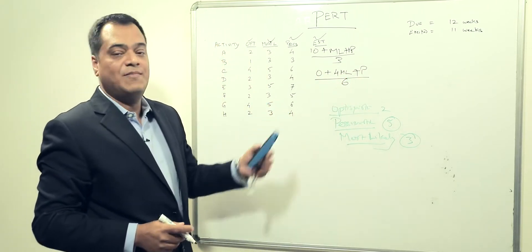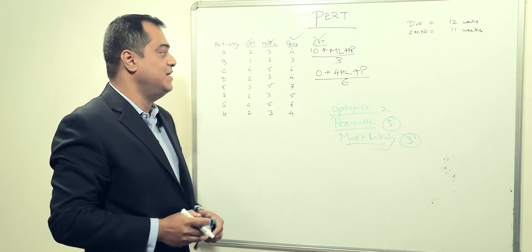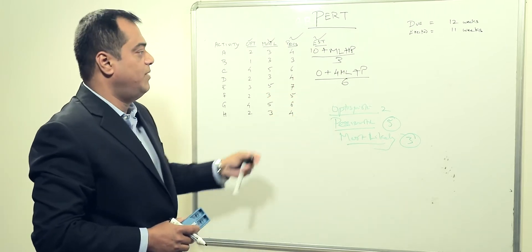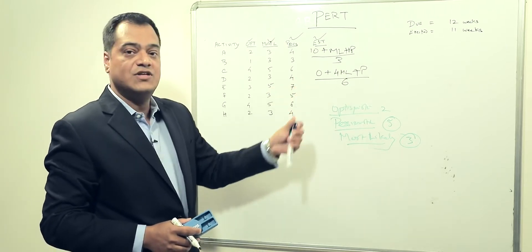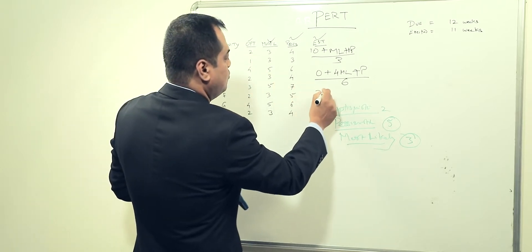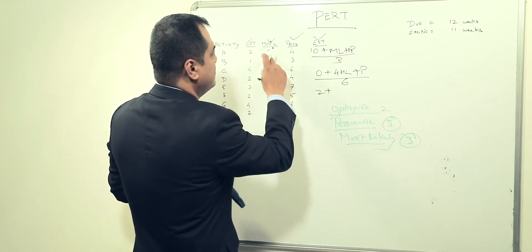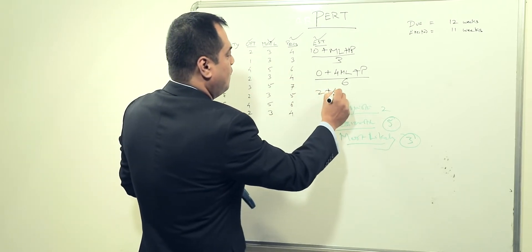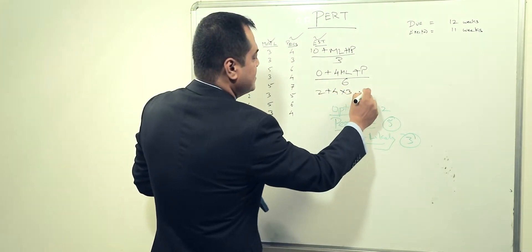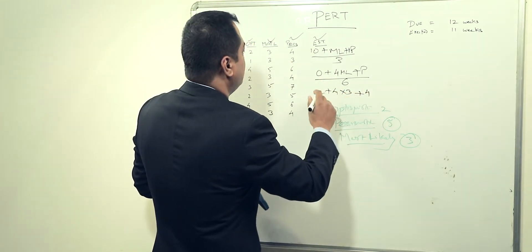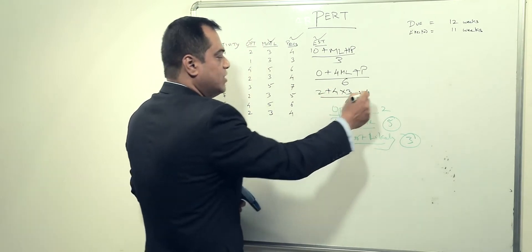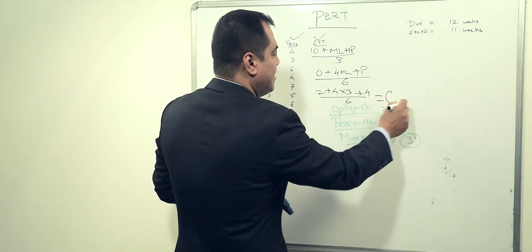Working out this formula, we get: two plus four times three plus pessimistic of four, divided by six. Whatever number comes out of this is our estimated value.